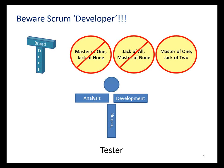So the lesson I think here is that we need to ensure sufficient test competency in the Agile team, otherwise quality is going to suffer, technical debt is going to increase, and productivity therefore is going to reduce over time. But also, just because we have a tester doesn't mean we have the required competency in the team, and we've addressed that competency. That might be a junior tester. And what about areas like test approach and high-level risk analysis and so on? They may not have that experience and competency. So again, you've got to be pragmatic and decide if you've got a resource in short supply. Ideally it's everybody's full-time, but if that resource is scarce, it may need to be shared between teams.